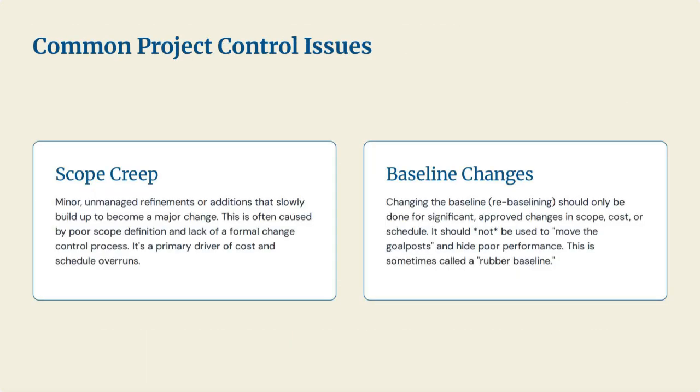Finally, 2 common pitfalls to watch out for. The first is scope creep. These are the small, unmanaged changes that just get added on. Can you just add this one button? Can you make this report in a different color? Individually, they're tiny, but they add up, and without a formal change control process, they will destroy the cost and